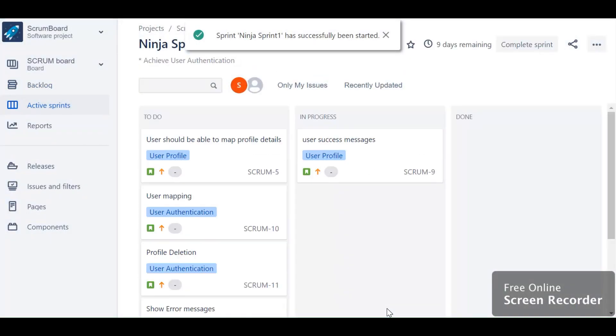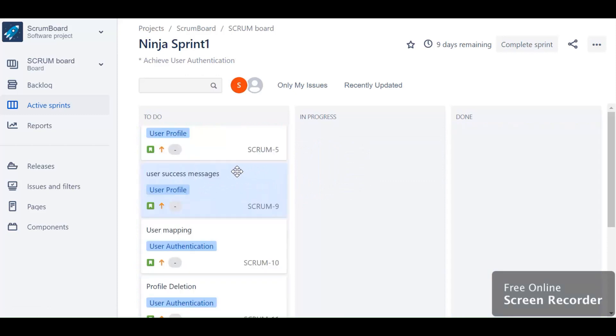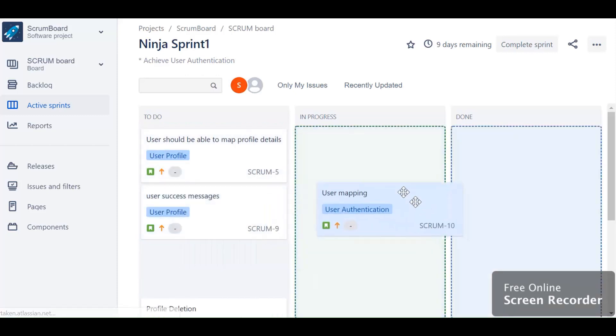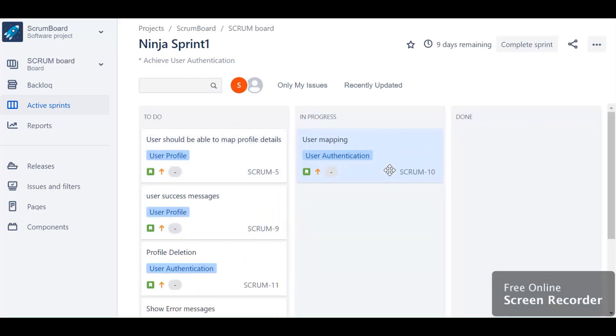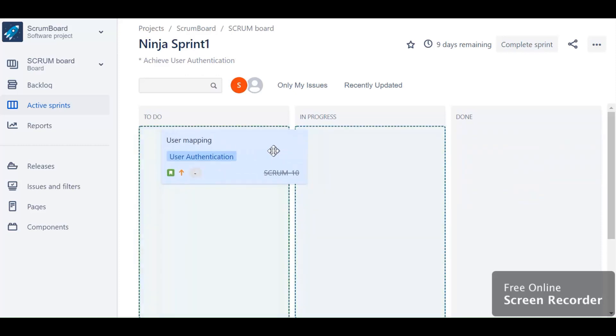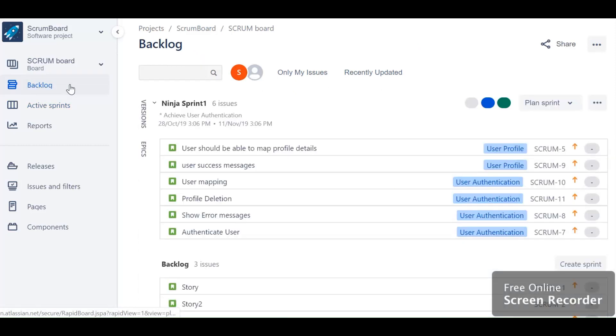Let's click on start button. We have started with sprint one. There are three swim lanes you can see - To Do, which is your backlog with untouched stories, then In Progress and Done. You can change the status of the story by just dragging and dropping. Once it is done, you can drag and drop. Let's go back to the backlog because I want to show you some more filtration options.